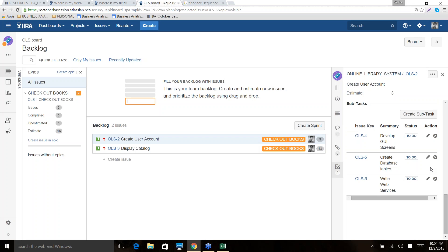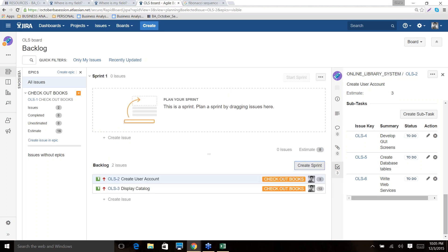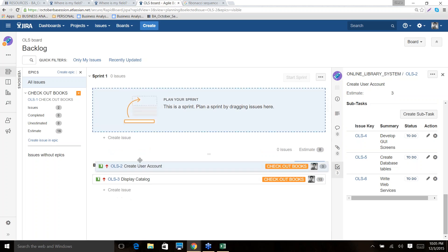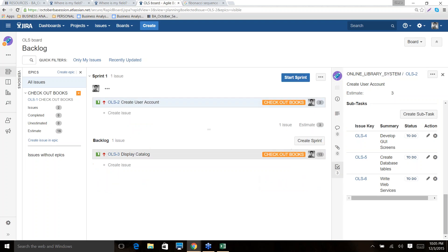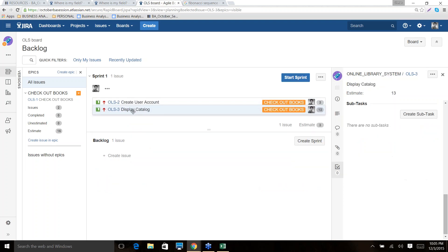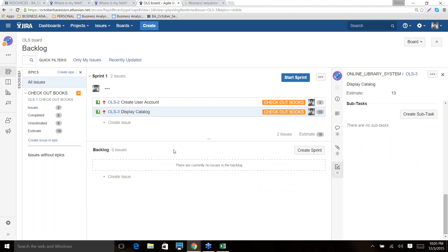Now let's assume we have done the sprint planning meeting and we need to initiate the sprint. Click Create Sprint — this will open a new interface. You then move your stories into the sprint by dragging and dropping them. My backlog is now clear because I moved my stories from the backlog to my sprint.